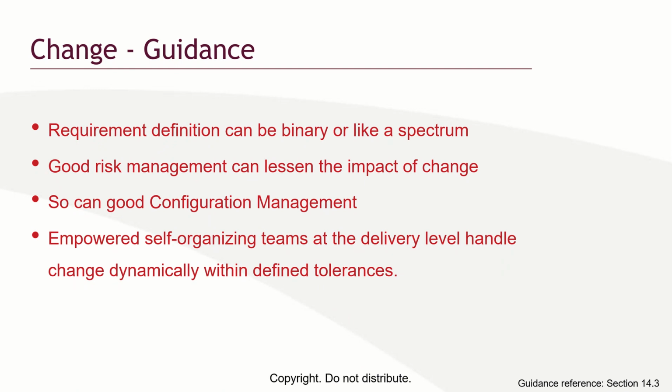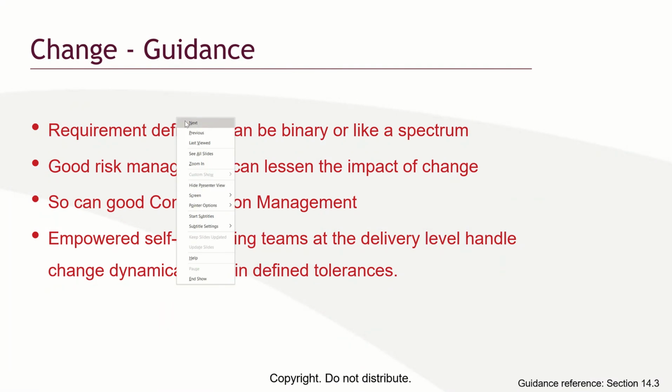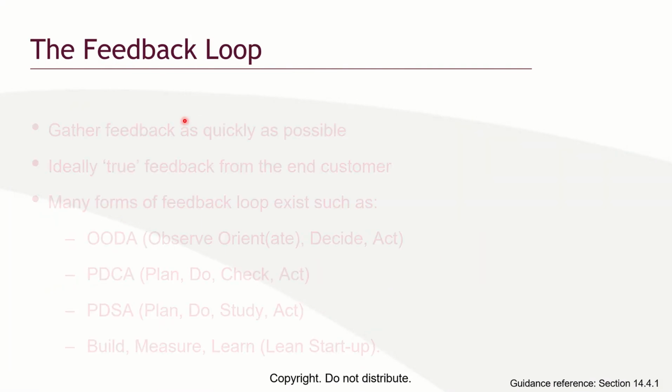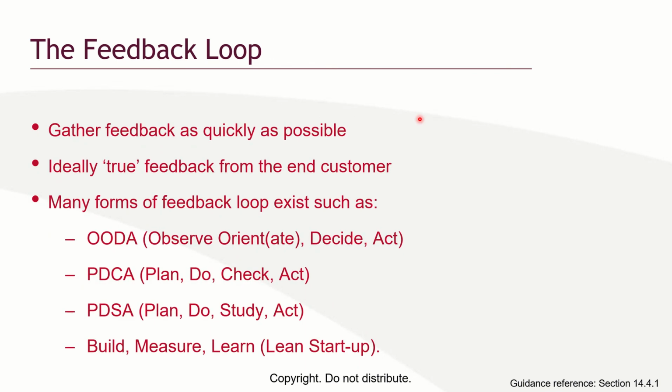Changes should be allowed. However, there should be a defined tolerance. What is a tolerance? How far can you change? As in, are you accepting change up to 20% or 10% variation? That is what we mean by tolerance. Because if there's no tolerance, then the change may completely consume the whole budget before you even reach half of the project implementation.